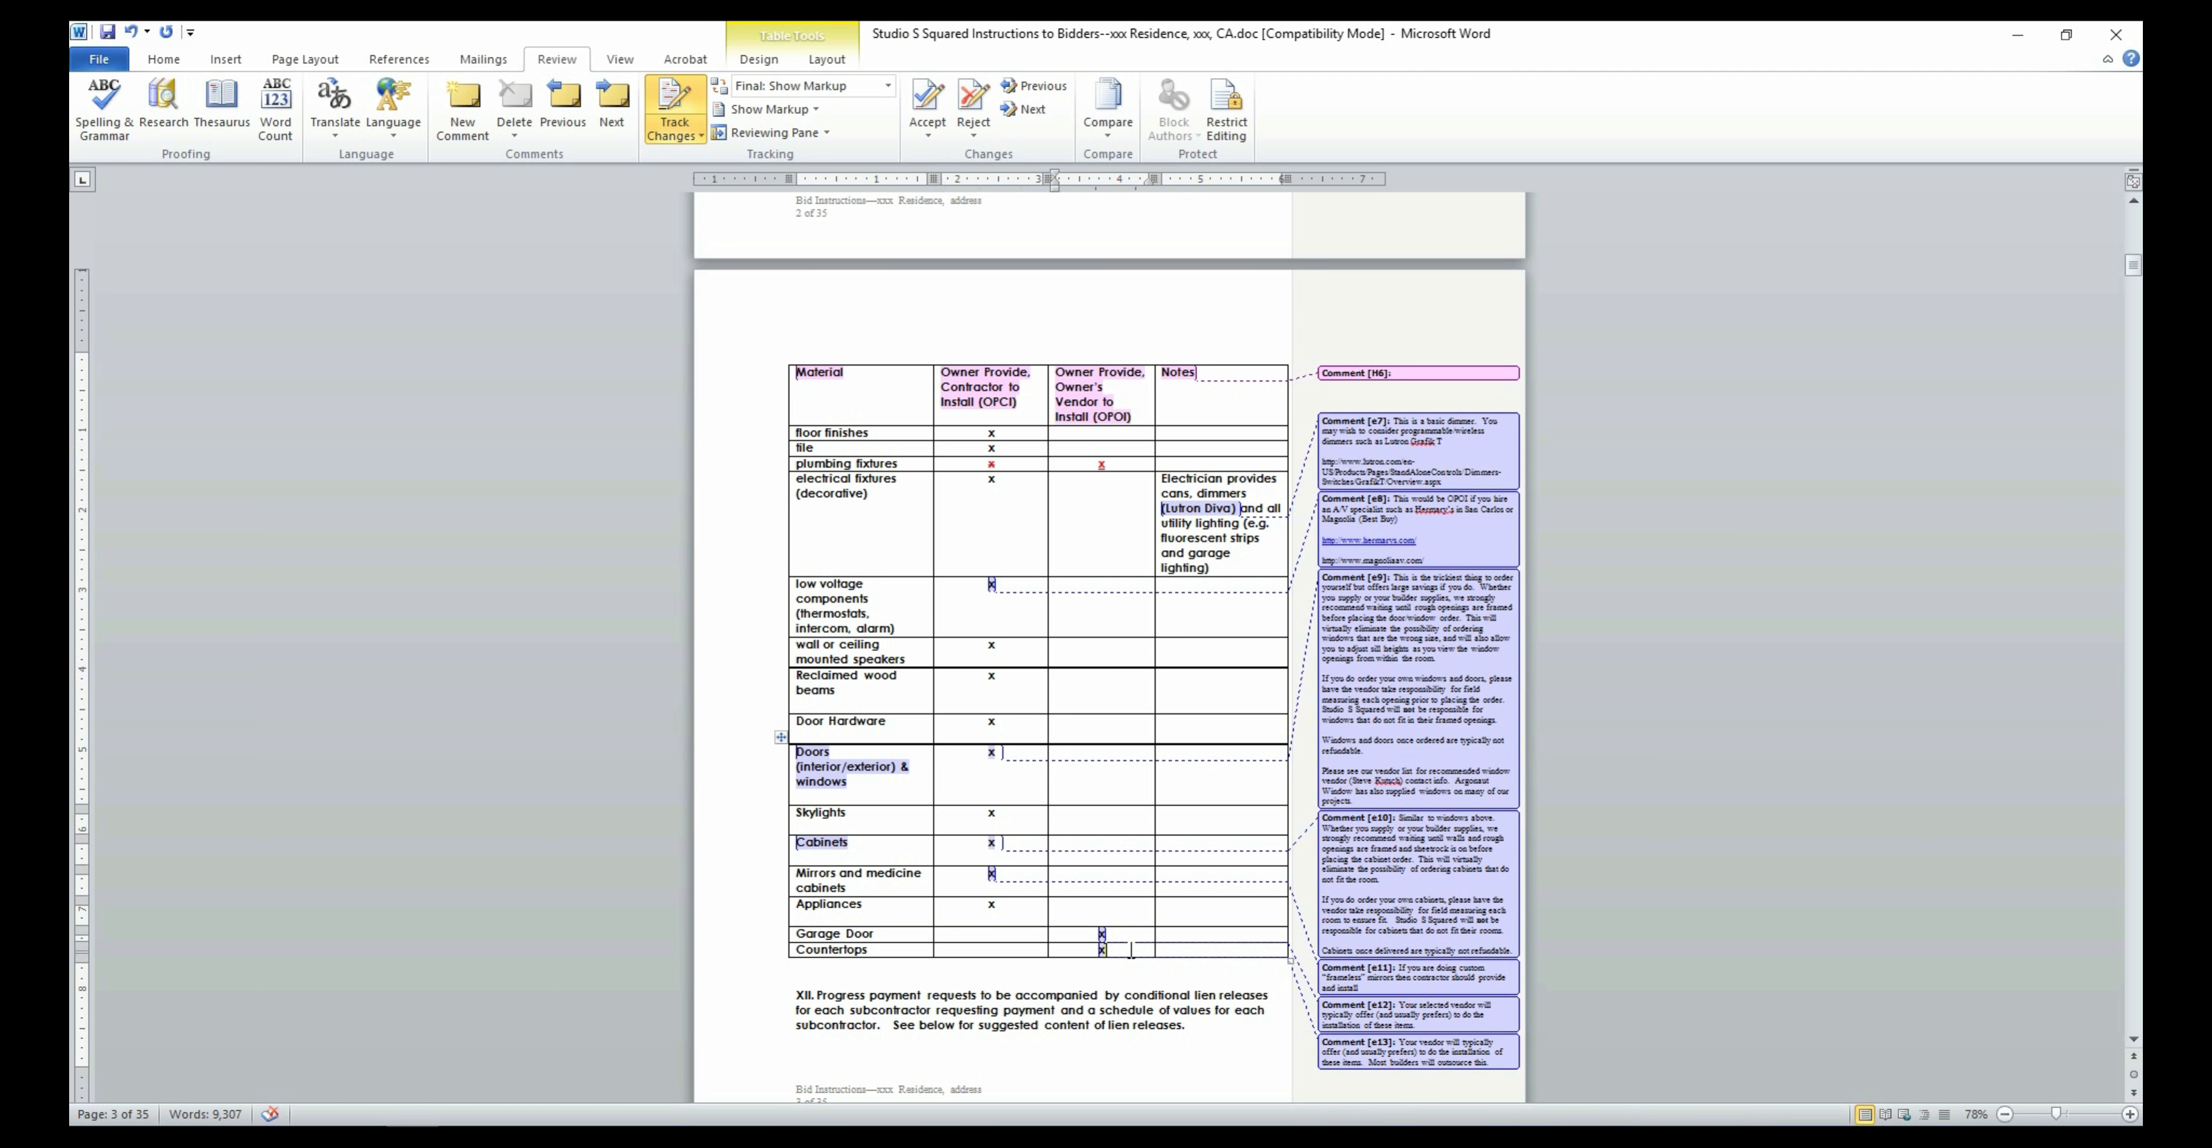There is yet another option: contractor provide and contractor to install, where the contractor will purchase all the materials on site and will have them install on site.